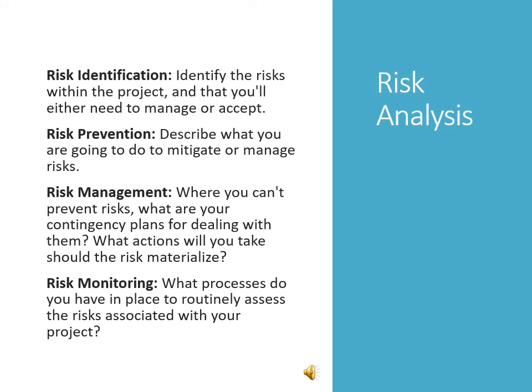Risk analysis includes 4 major components. Firstly, you have the risk identification, where you identify the risk within the project that you'll either need to manage or accept. You have risk prevention. You describe what you are going to do to mitigate or manage the risk.